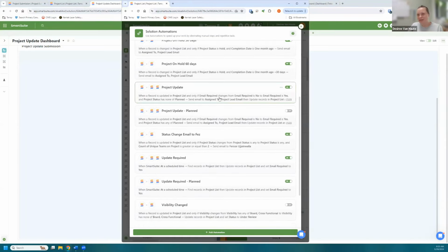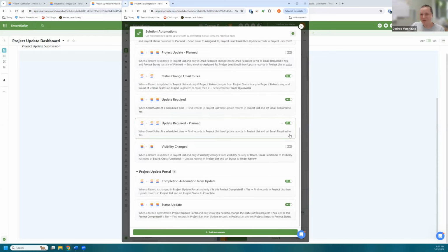If projects are on hold for extended periods of time, we send an email to ask people if this project status is all right, or if we need to evaluate whether it's resourced appropriately, or if we need to cancel it. We have executive team members who wanted an update every time something changed on a status. And so we helped develop that for him so he could get the kind of information he was looking for. And then Jeff helped us do those automated update requests, where if an update's required, it checks a field. If that field is checked, we send an email. And so we use automation to minimize the amount of time that we have to run around and find people to answer these questions so that we can focus on solving the problems that they bring up.